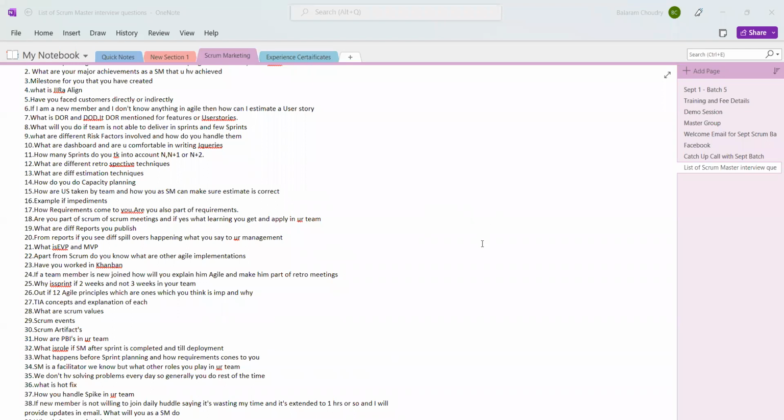No, I'm not sure why the development and QA capacity is not considered. We should be considering QA capacity and differentiate the total capacity: on the QA side we have this much capacity, on the development side we have this much capacity. We should show this segregation ideally. That's the right practice actually.